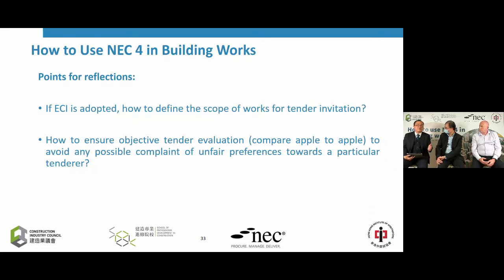In Hong Kong today, especially in the political environment, we are very sensitive to say that you have to have a very fair tender process and also a very, very fair tender evaluation mechanism. So you don't allocate too much discretion to the one who is going to do the tender assessment. You don't give him too much discretion because we are talking about accountability and public revenue. So you must have a basis for facilitating a comparison based on comparing apple to apple. So I guess if you are adopting the ECI approach, maybe someone has to do the evaluation of tenders based on comparing an apple to an orange. So you have to overcome that kind of issue if you're talking about works in a public sector context.